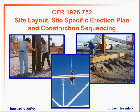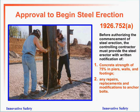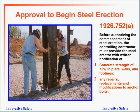Let's start out — numbered as they are in the standard. The first is 1926.752, which deals with site layout, site-specific erection plans, and construction sequencing. You need to get from the general contractor written approval to begin steel erection. Before authorizing commencement, the controlling contractor must provide the steel erector with written notification that the concrete strength is at least 75% in the piers, walls, and footing, and must disclose any repairs, replacements, or modifications to anchor bolts that have been made.